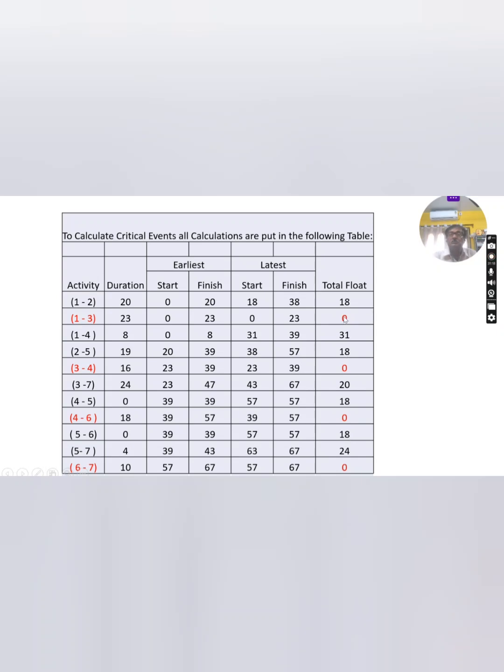Where there is no float, meaning there is no slack value, that is the critical activity. In this case I have highlighted in red the critical activity 1-3, because the float is 0 and there is no slack. You cannot delay here. If you delay, it will affect the total completion time of the project.